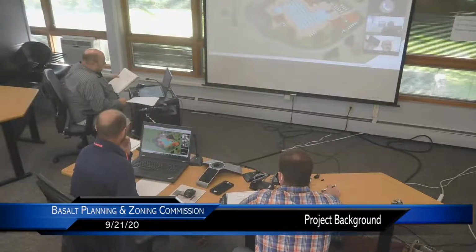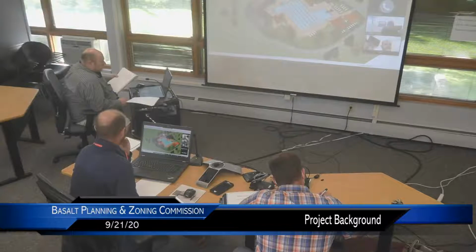But if you want to go for it, and you think you've got the right people to do this job in the right amount of time, you would get some serious brownie points for getting all this done: the robot pool, the changing rooms, and the interior remodel of the pool by May 21st. However, the ultimate end date of the contract would be December 21st of 2021. There's some flexibility in that. So we're looking for the contractors that are bidding to provide a proposed schedule. Does that answer your question on that one? Question, Chris?